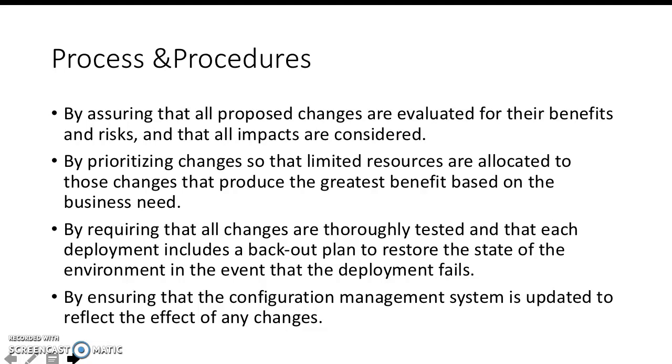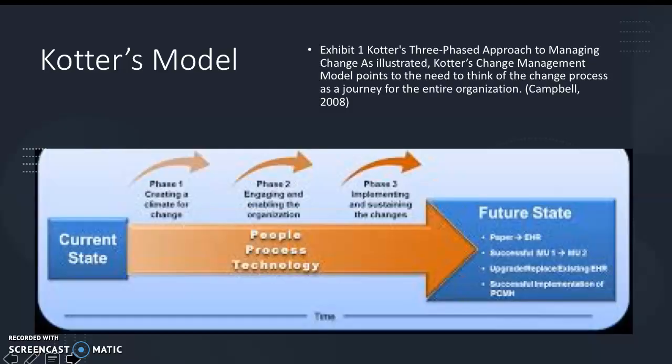We also require that all changes are thoroughly tested, and that each deployment includes a backout plan to restore the state of the environment in the event that the deployment fails, just like we restored the systems back from the nurse's bed situation, and then restored the respiratory therapy systems back so they could enter their data. We also have to ensure that the configuration management system is updated to reflect the effect of the changes.